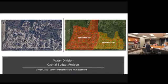The other thing on this one, we're going to do the primary lining, whereas there was a lot of excavation before. So how we rehabilitate is going to be a little different than we've done, because, as I said earlier, we're at the right elevation and the capacity is fine. With good cleaning, we feel like the majority of the line can be rehabbed with that liner in place. We've got a lot of the manholes that can be modified, but we still have several that may be replaced. So all of those are identified as part of the project. So a different approach, same result. When we get through, the neighborhood would probably still have a system that's good for another 70 years.